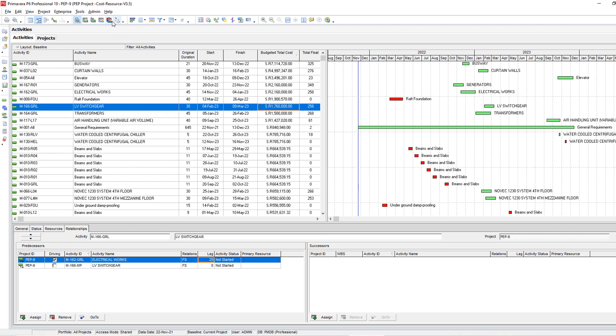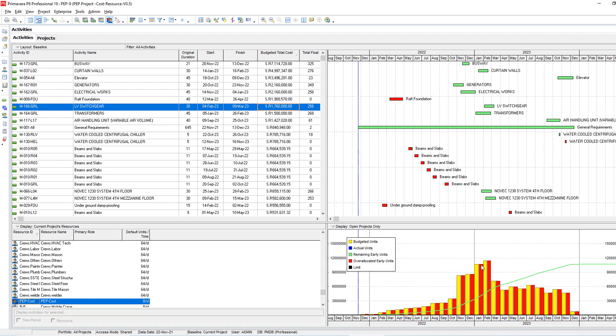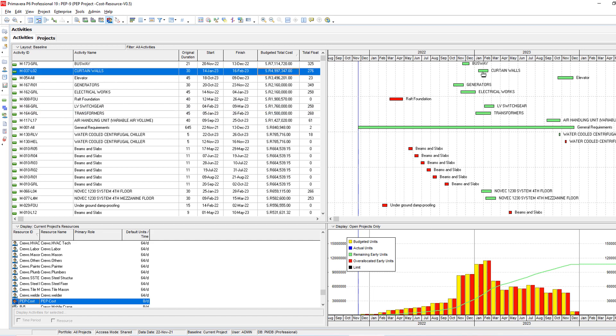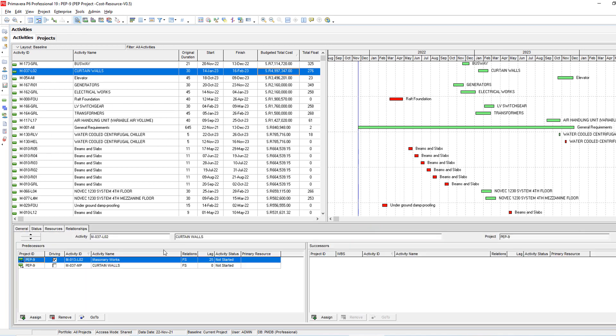Then go and check what is going on. It is fine in January, now February became too much. No worries, because I have other activities I can move. The best way is to play with the most heavy activity. I can go and do more moving in January and February, but I prefer to play with one activity which will fix everything, especially I have here some good floats, so I'm going to move this one more.